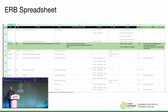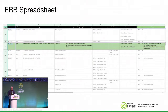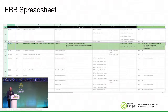Here's an example of the changes tab in the ERB spreadsheet. To the right of the screen on column I, you'll see the discuss column. Row 40 has clicked yes, so it highlights in green — at the meeting you can very quickly see that this one needs to be discussed. Column H shows the changes from Sergey's script: for example, on the 15th of February the resolution was changed to none and the status to reopened, then closed and delivered the same day. All those types of changes not readily available in the card details are collected in that changes column.